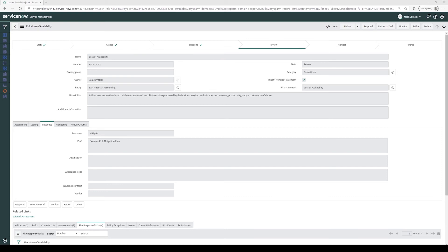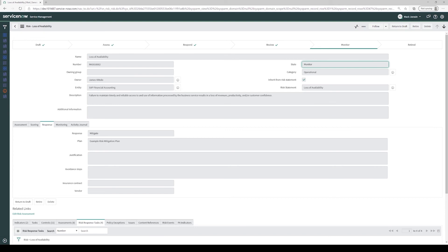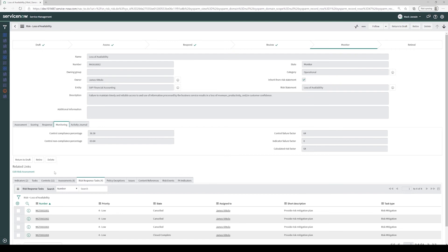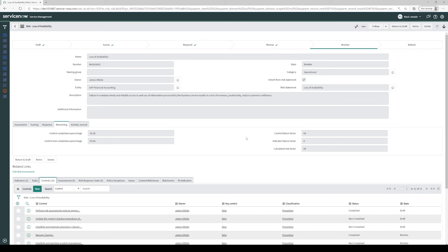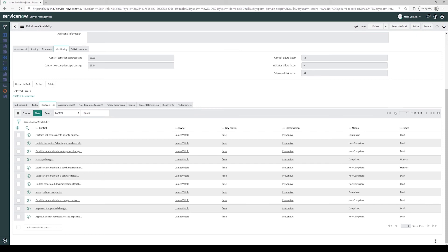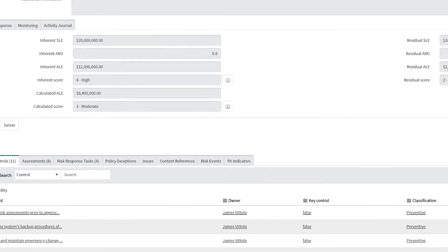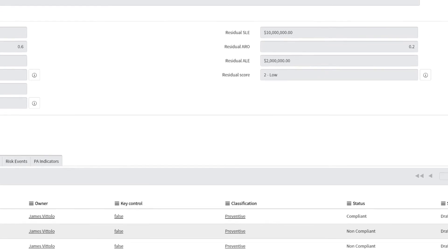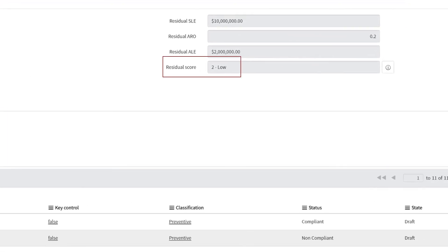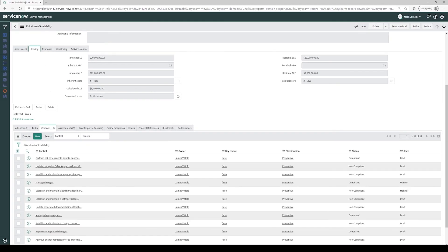After reviewing the risk, if our risk managers agree with our risk response plan, they can click Monitor and our risk will be moved to a monitor state. Now that our risk is in a monitor state, we can click the Monitoring tab and click the Controls related list. If we scroll down and look at our list of controls, we'll see that their statuses roll up to the control compliance percentage, which results in a control failure factor of 64. Our control failure factor directly informs our risk scoring. When we click on the risk scoring tab, we see that our risk has a calculated score of 3 moderate. This is in between our inherent score of 4 high and our target residual score of 2 low. The calculated score happens automatically in real time as our control compliance changes. This enables us to see the impact that the control compliance of our mitigating controls has on the risk in real time.